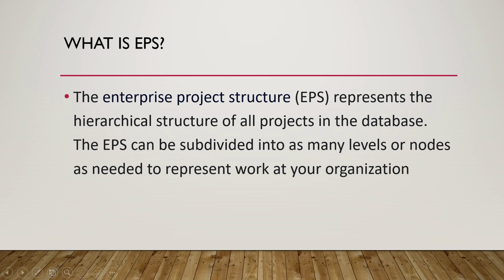EPS, the Enterprise Project Structure, in short form called EPS, represents the hierarchical structure of all projects in the database. The EPS can be subdivided into as many levels or nodes as needed to represent work at your organization. Every project must sit in a database structure known as EPS or classification.